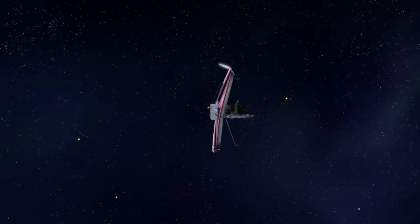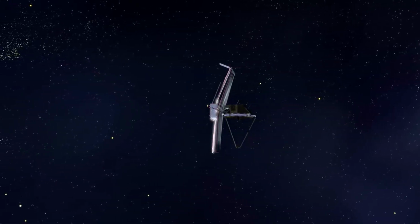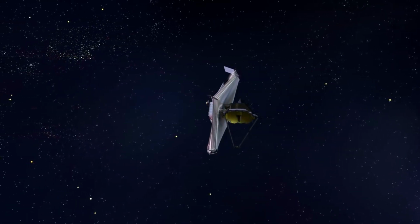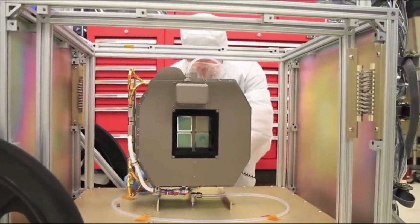At the end of each week, the LRPG will update the observing plan to reflect the actual programs that were executed, and to identify priorities for the following week. In this way, the LRPG and STSG work synergistically together throughout the observing cycle to maximize the scientific return from the observatory.